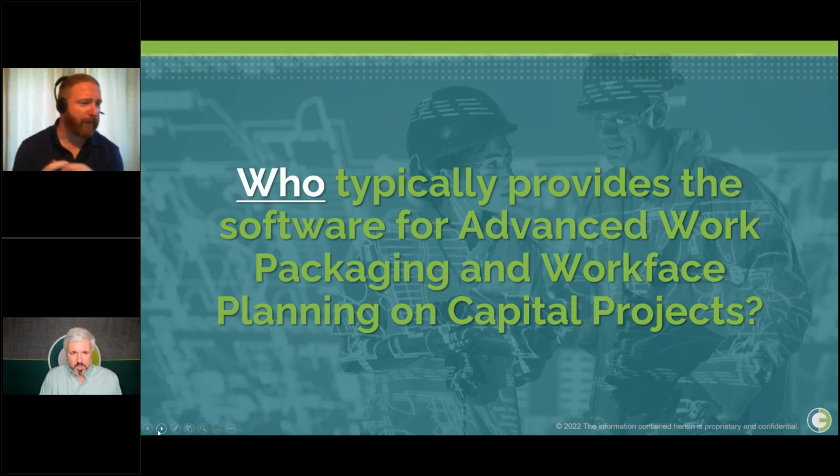First up, Josh, who typically provides the software for advanced work packaging and workface planning on capital projects? Well, historically, we've seen the owner or EPC take the lead with AWP technology, especially when it comes to workface planning. And typically, this seems to be due to two main reasons. Firstly, the value proposition is usually most attractive to the owner, especially when they're taking on execution risk for the project. They're the ones with the most to lose from inefficient execution on site in terms of cost and schedule.